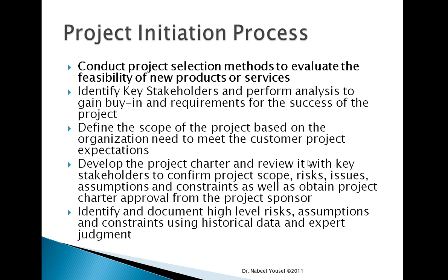The second will be to identify the key stakeholders and perform analysis to gain the buy-in and requirements for success of the project. And then define the scope of the project based on the organization needs to meet the customer project expectations. The fourth activity will be to develop the project charter and review it with key stakeholders to confirm that this is what we are going to deliver at the end of the project.